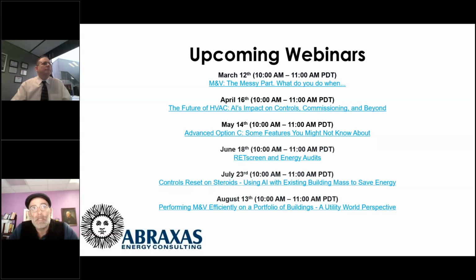And so what's the problem? Is it because the O&M staff are boneheads? No, maybe they're short-staffed. I think the problem is that the ESCOs aren't handling retro commissioning correctly. If you want to do retro commissioning, you have to keep showing up every year or maybe every quarter, and look through maybe not all the controls, but a couple buildings this quarter, 2 other buildings next quarter, whatever, and then work with the staff to fix some of these things. It's like, we need to take these overrides back off. Okay, can you handle that? Yes, I can. Okay, good. And then you can keep your savings.